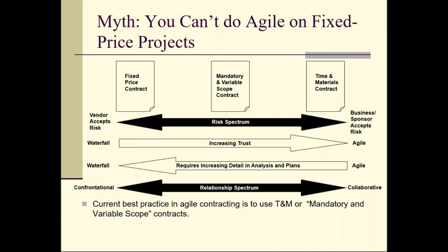I probably am going to hit around 60, so it looks like I might be done early unless things slip, in which case I will use that buffer, but it's within the plan, and it's not labeled as buffer, so the client will be delighted. If I'm a little bit ahead because I'm working closer to 60, that's good news to the client, but I still protect my buffer.